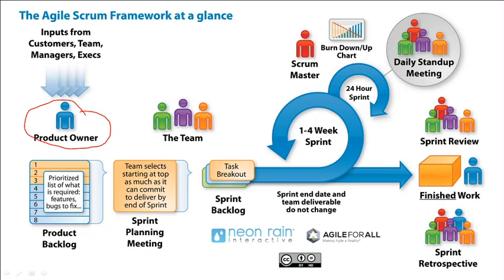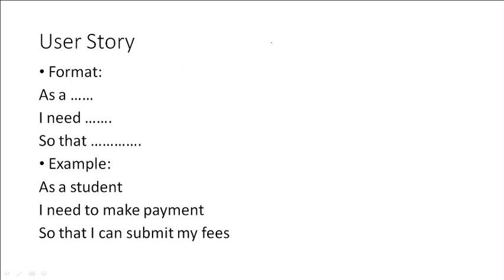For example, suppose GLA University assigned a particular person as product owner. That person is responsible for collecting information from all stakeholders of GLA University — faculty members, students, their parents, and management. After collecting requirements, this is the responsibility of the product owner. The requirements will be arranged in a backlog known as the product backlog. In the product backlog, requirements are arranged in the form of user stories. In traditional models, requirements came in the form of SRS, which are very large, descriptive, and complex to modify.